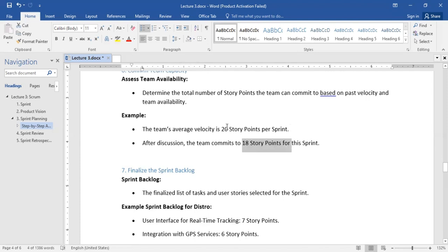Why can't you just make it 20? You are accounting for delays. The 2 extra story points give room for delays, in case there are barriers or challenges beyond your control. Maybe you felt it's just a matter of linking this and this together, and in the process of linking, you experience a roadblock. So you reduce it so that at least your team can complete that particular sprint in record time. That is what team capacity is about.